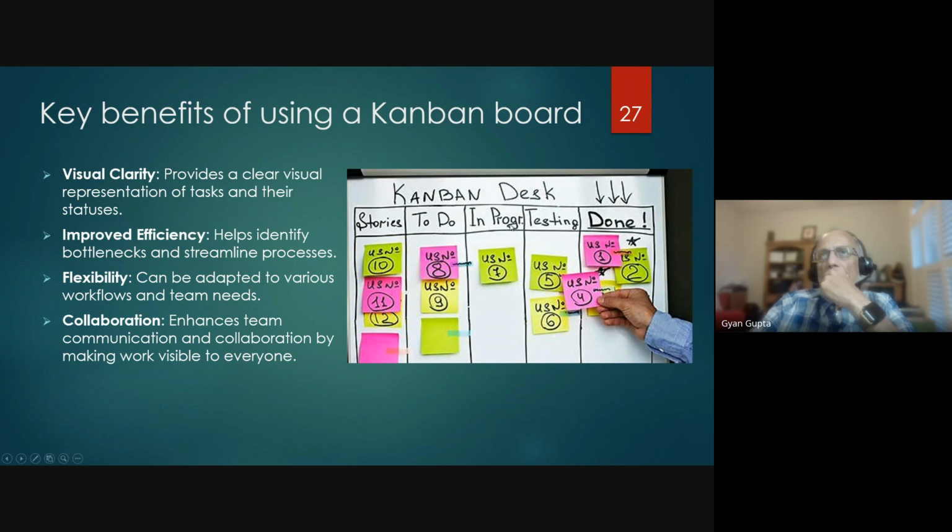What's in progress? What goes from progress to testing? The exit criteria for in progress is that when all the development is done, the code is in the right place, and somebody is ready to test the code, then you move to testing. And the exit criteria for testing to done is when all the regression testing is done, all the functional testing is done. Each team can define their own testing criteria, and these exit criteria for each have been agreed by the whole team.